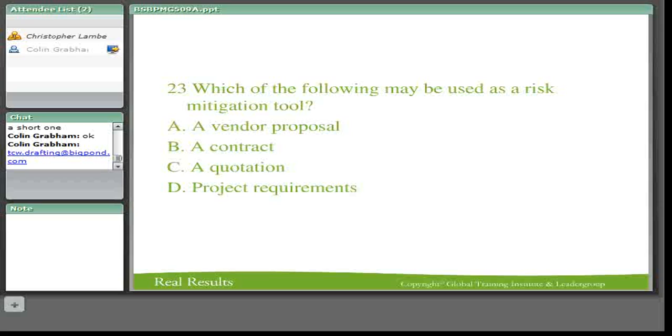So you're going to see all of these things come out. Okay, so what it was, then you would put in your change control. What change control did you do? And what was actually changed to do it? So how did you do it? And then actually what was changed? And the change control ID number. You normally would have a change control ID number because you'd number your change controls.